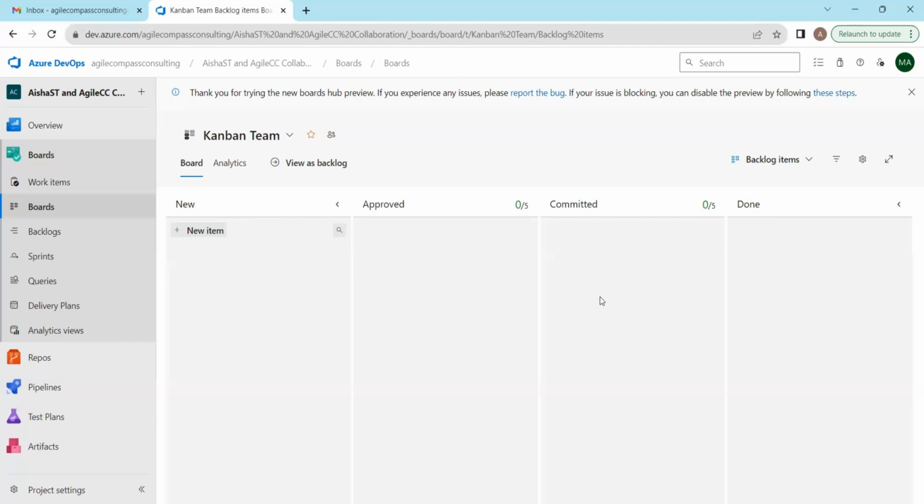There are two main practices in Kanban that ensure that we are actually a Kanban team, basically. The first thing is your Kanban board should have a visual representation of how your team's workflow is. This is our visual representation, but we need to edit or review it to reflect the way that we work.